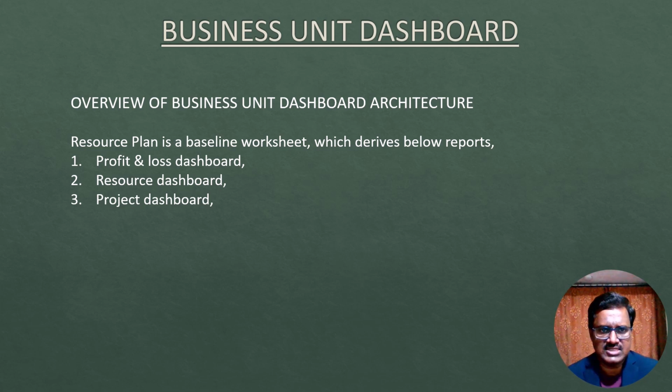Next, the project dashboard highlights values like SPI, CPI, TCPI, etc. specific to the project to date. It also helps identify the forecasted cost of the project and the expected targeted completion considering the current performance.